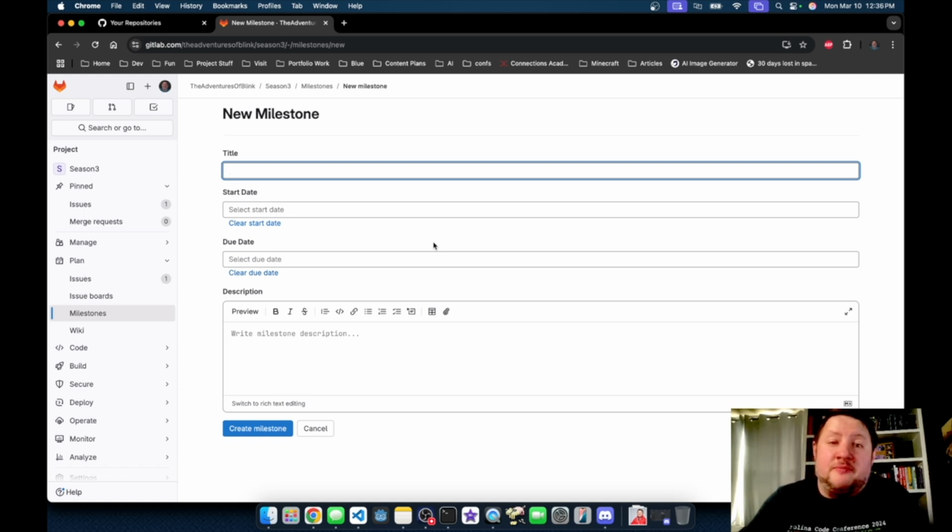Now, let's say we had 100 issues reported out here. We may not be able to fit all 100 into version 2.0. We might have to break up the work, and then 2.1 or 2.2 or 2.3 even, or maybe as far as 3.0 would eventually address some of those issues. But if you create milestones, you then have the ability to tag an issue as being related to this milestone, which will help the team understand.